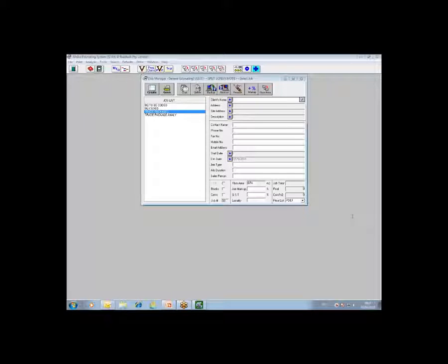So you could simply delete that uncoded section in the analyzed job, print off your painting section, and work with it, maybe send it out to a particular subbie if needs be. So if you want to just take out an individual trade package, yes, you can just code that up in the original bill, run the analysis, and then just use that particular section. You don't necessarily have to code absolutely everything all in one go.